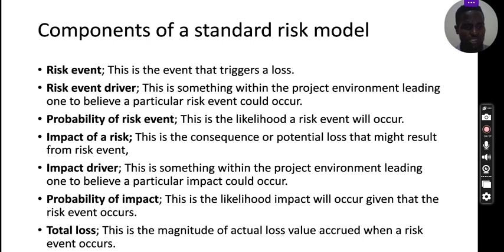That is the impact of a risk. Then impact driver: something within the project environment leading one to believe a particular impact could occur. This is something that will drive you to believe that surely if this risk happened, this impact will come along with it. Then the probability of impact: the likelihood that an impact will occur after the risk has occurred. Then total loss: the magnitude of actual loss value accrued when a risk event occurs.